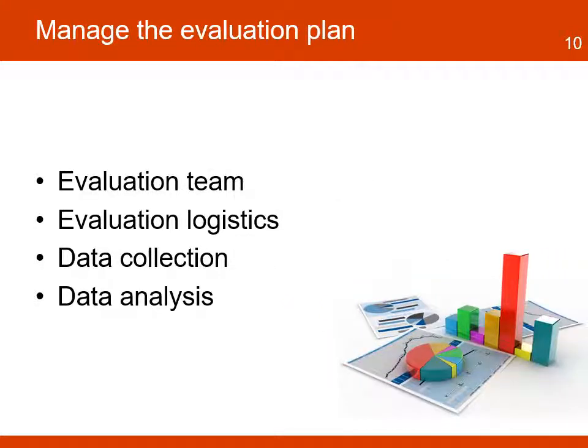Manage the evaluation plan. This is a step where the consultant will initiate implementation of the evaluation and the project manager or the M&A unit will manage the plan. This step includes the formation of the evaluation team, the management of logistics such as transportation and communications, the work of data collection and data analysis.